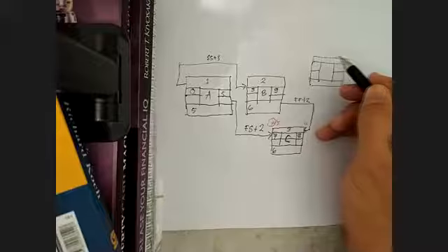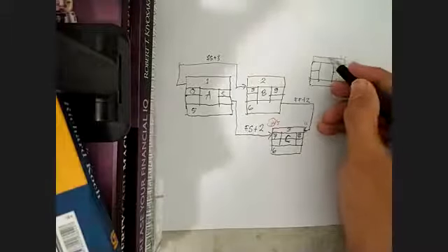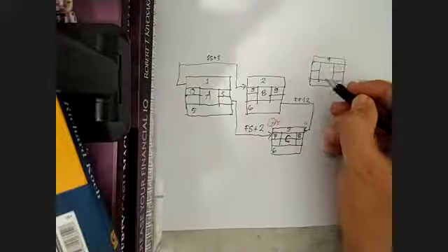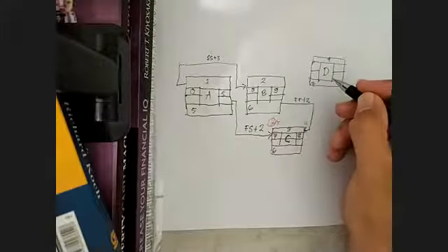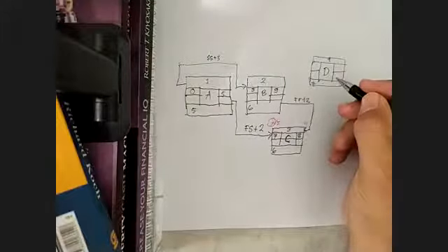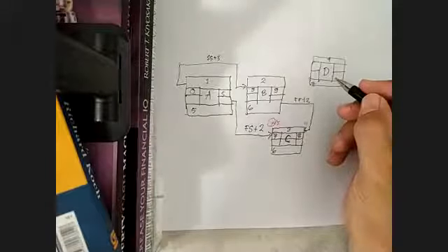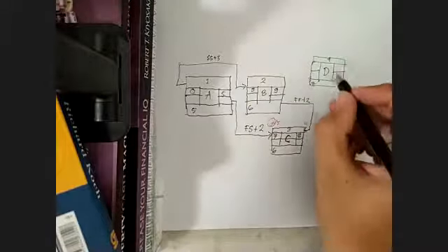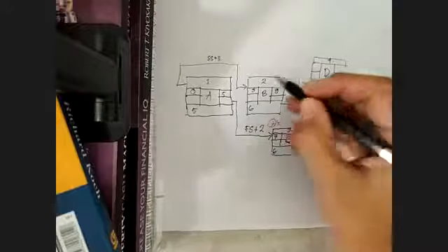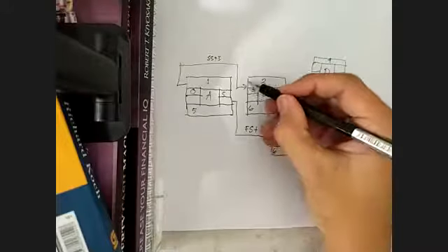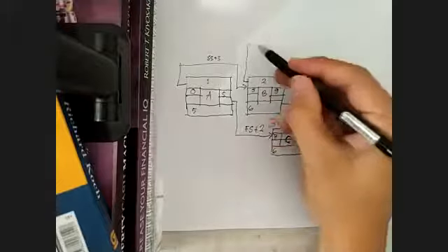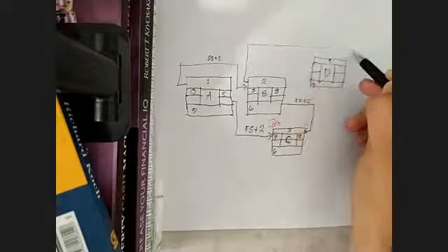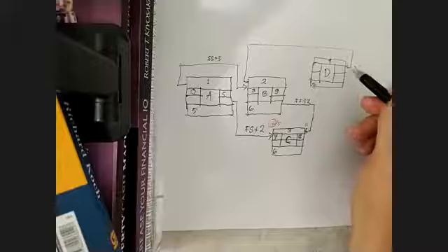Activity D has the number of activity 4, the name of the activity is D, with the duration of 7. Okay. Based on this equation, we get the predecessor SF from activity 2 and 4. Start means we start from the left side of 2 and 4. Finish means we have to put the arrow on the right side of the activity D.